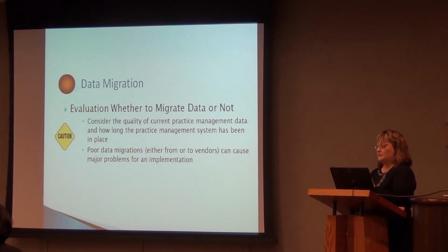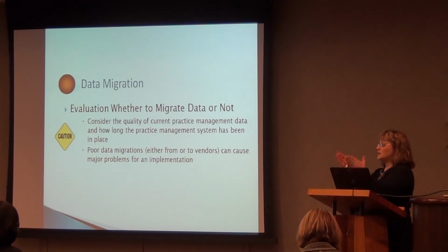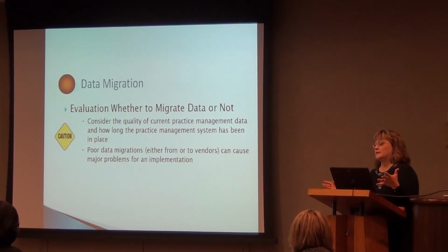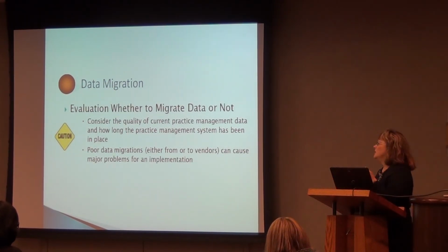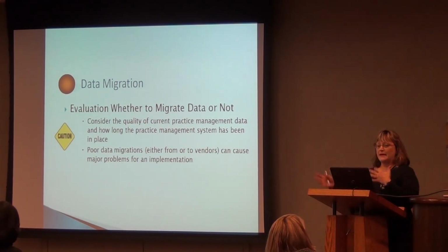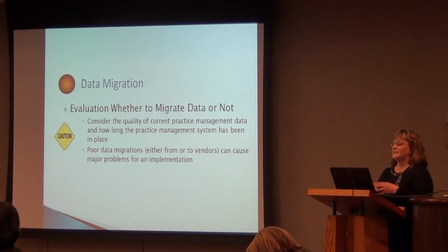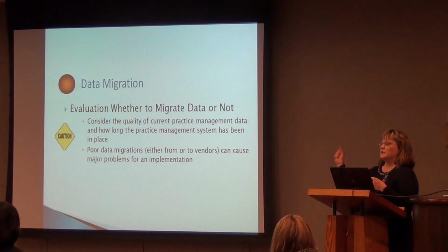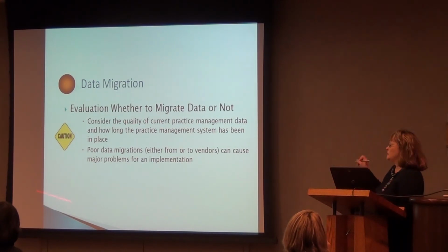So when you're migrating the data to your new system, make sure you double check that data. Check hyphens, check dates of birth, check a lot of patients and make sure that they look okay in the new system. I've also had a pediatric practice where they pulled the data, and because some of the coding was off in the computer language, all the patients' dates of birth were 1 to 150. So it became a geriatric practice real fast. And the reason we knew this is because all of a sudden Medicare alerts popped up for every patient to get them to sign it. Like, what's going on? And then, wait a minute, the dates of birth are 1 to 150. The computer people were able to go and alter the file. It was just a character off that caused that computer to create that. So you really want to get a good sampling of your patients, check them in your new system.